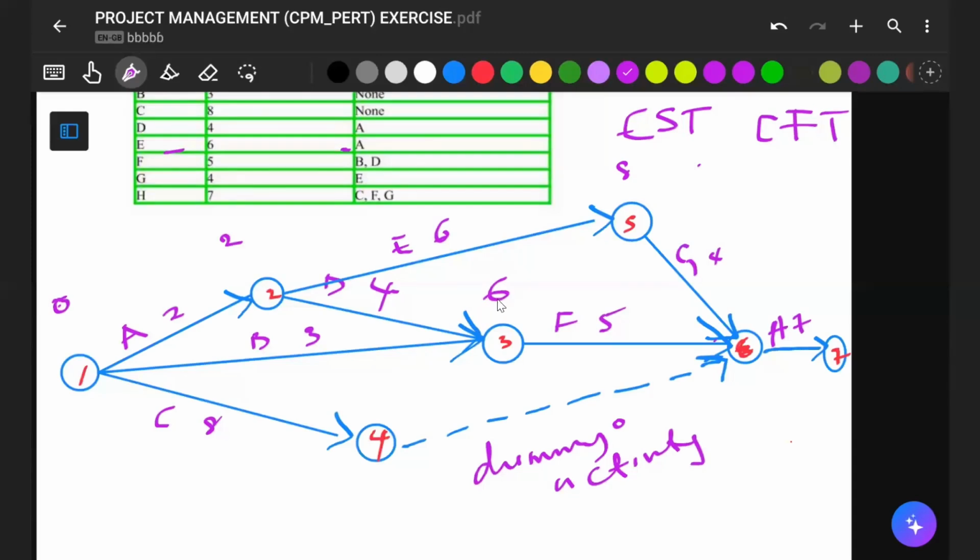However, this may not be its own earliest finishing time. And that is why, when you start calculating your float, you realize that B can actually finish before 6 months. And that is true because B has a duration of 3 months. So that observation is quite in order.